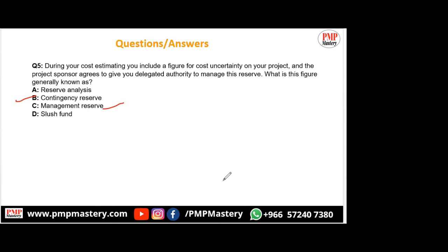I believe it is the responsibility of the project manager to cost estimate contingency as a project. But management reserve is beyond the responsibility of a project manager. It is imposed onto the project manager to include in the overall development estimate, not the project estimate. Contingency reserve is for the project within the project estimate, but management reserve is beyond the project estimate. For example, the project is a net estimate, but for the gross estimate, you must include management reserve.